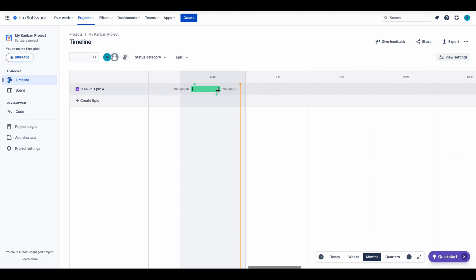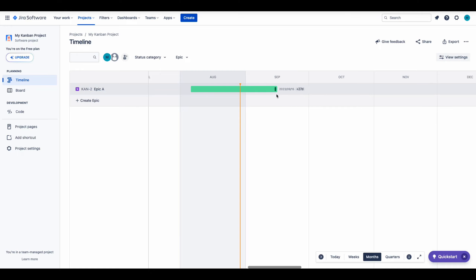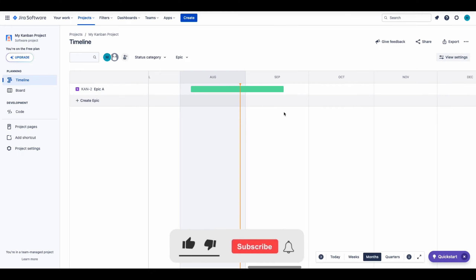You can adjust the duration of the Epic by dragging it to left or right on the timeline. And this is how you can create an Epic in Jira.